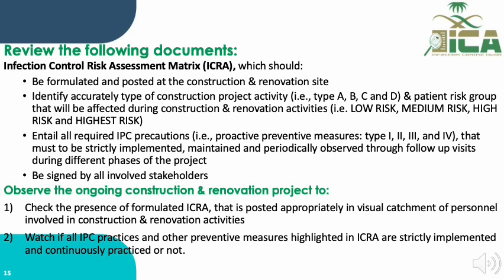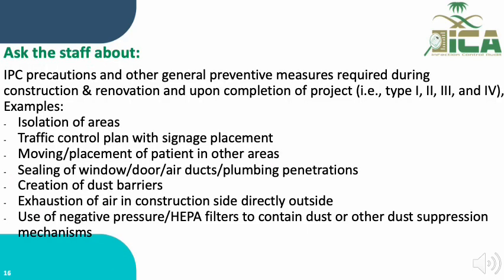For the observation activity, we check whether the formulated ICRA is posted appropriately within the visual catchment of persons involved in construction and renovation activities, and whether all IPC practices and preventive measures highlighted in the ICRA are strictly implemented and continuously practiced. For staff interview, we ask about IPC precautions and preventive measures required during construction and renovation across Types 1 through 4, including isolation areas, traffic control plans with signage, air exhaustion from the construction site directly outside, use of negative pressure or HEPA filters, and dust suppression mechanisms.